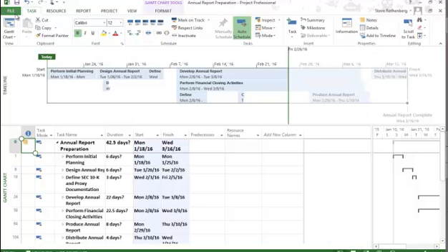And then when you actually assign people to tasks, you have a third database, which is sort of the intersection or the joining of the two databases. So you'll have tasks from one database attached to people from another database, and that's why Microsoft Project gives you this viewpoint that is made up of 3 databases. So that's what's going on pretty much on page 6, page 7, and page 8.